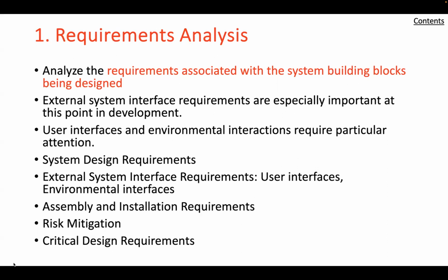These are the components that represent the greatest development risk, and hence their design approach must be carefully analyzed to ensure that the residual risk has been reduced to manageable levels. For example, components with initially ill-defined external interface descriptions must be re-examined to resolve any remaining uncertainties.